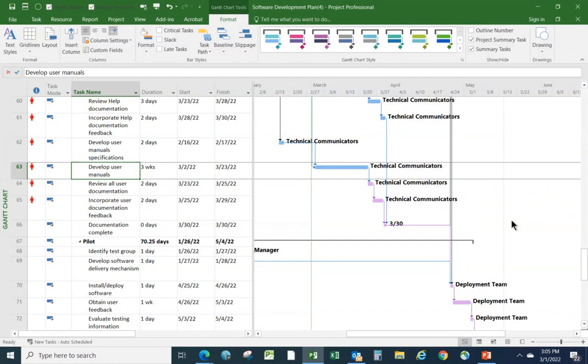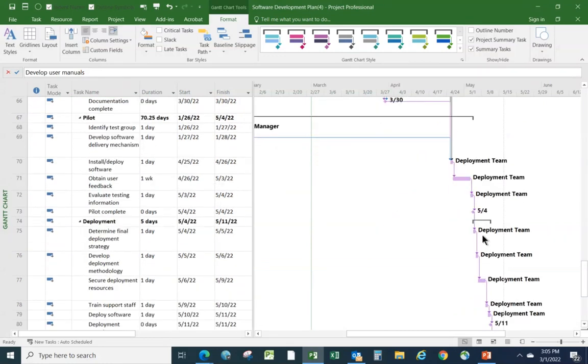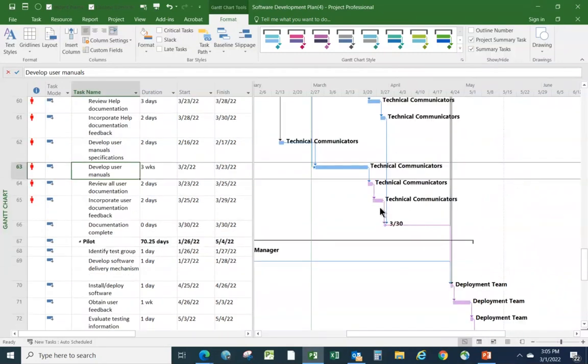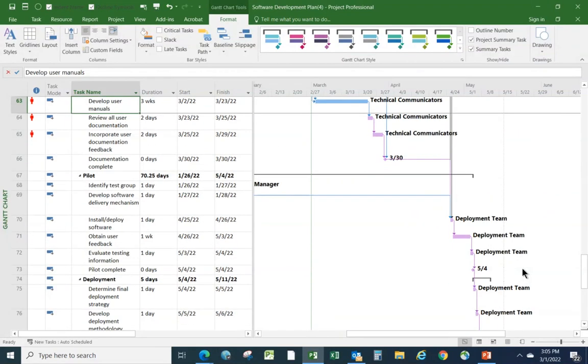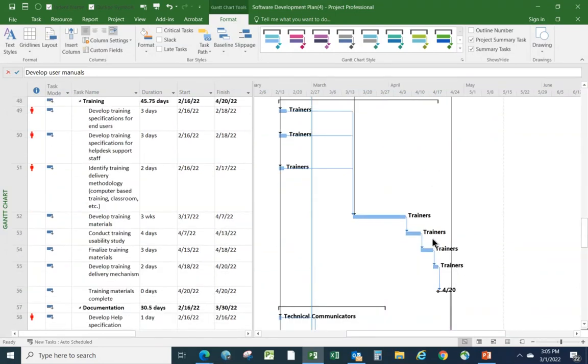And now we've got a nice pale purple lavender color for everything which is linked following task 63. Somewhere downstream, there's a linkage which goes from task 63 and ends up linking to all of those pale lavender tasks down there. But now let's look at this task down here, which is task 70. That is downstream, but it's not being driven to that point by these. It's being driven by some other tasks further up here.